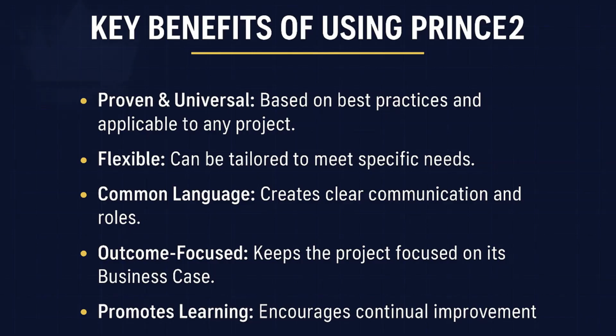Stage 2, the main delivery stage, is then structured into 4 sequential time boxes. These are the iterations where the actual software development happens, maybe 2-week sprints. So PRINCE2 provides the overall control for the stage and manages the inputs and outputs of those iterative time boxes. Exactly. The project manager, operating under the controlling a stage process, CS, manages the work within those 4 time boxes.